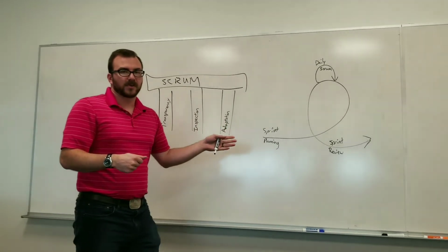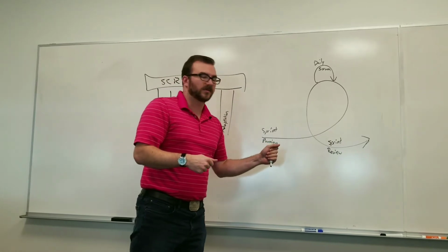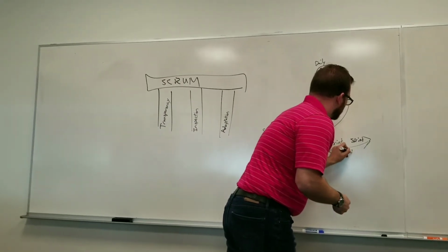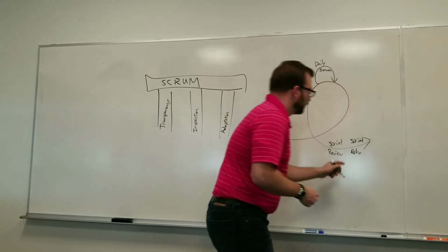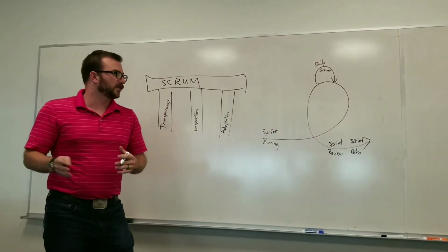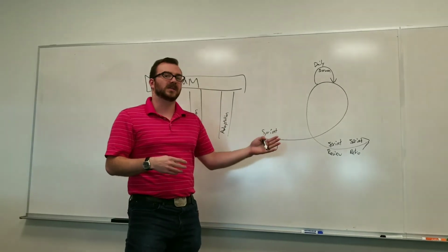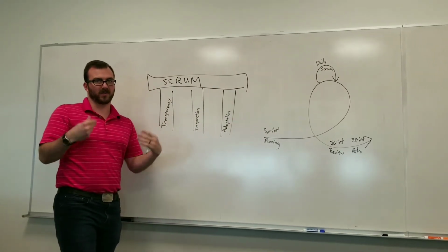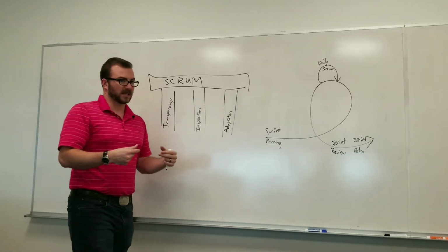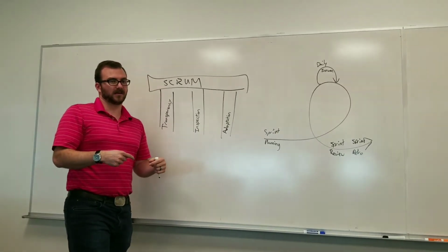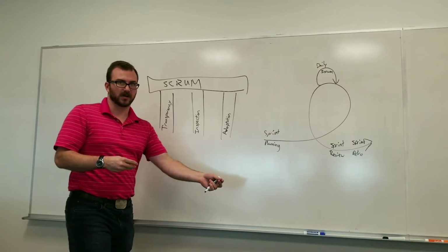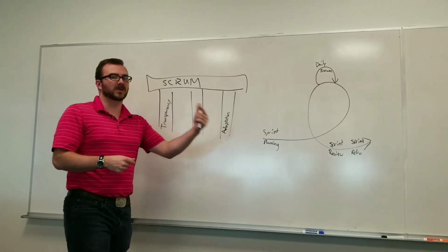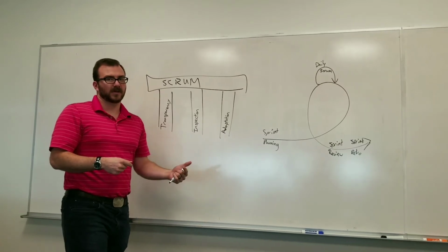After our sprint review, we move into another event, which is our sprint retrospective. Instead of looking at the sprint and the work that we did, we're now being transparent with each other about how we went about our work. We're inspecting what we did in order to accomplish our work, and how can we adapt in order to be more successful going forward.